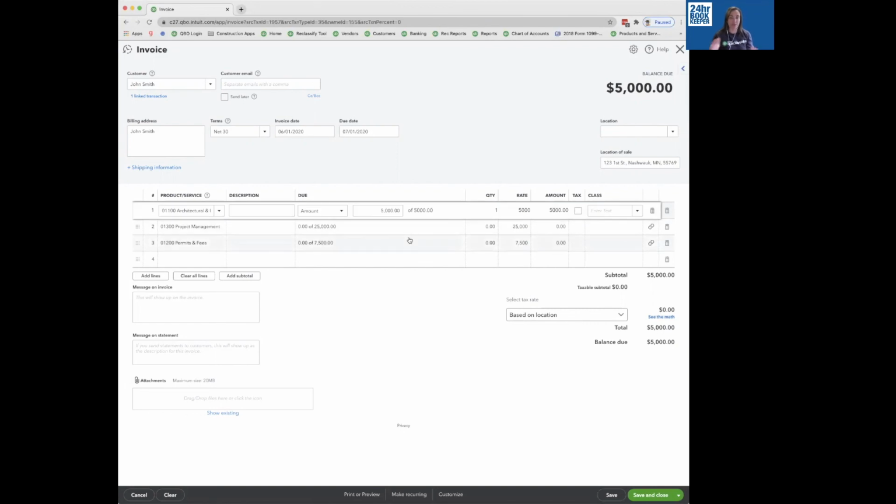So it's the same process that you would repeat. Ideally, you would have had an agreement with the client that notifies them when billing will occur. And if you are using this through QuickBooks and doing your invoicing this way, this is a great way to milestone bill or to bill through phases or percentages throughout your project without using anything else.